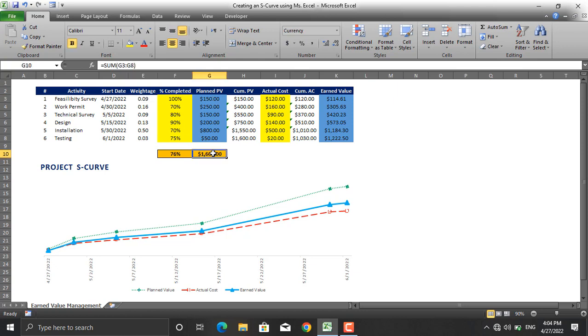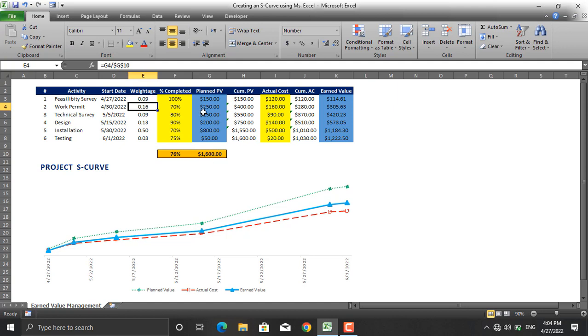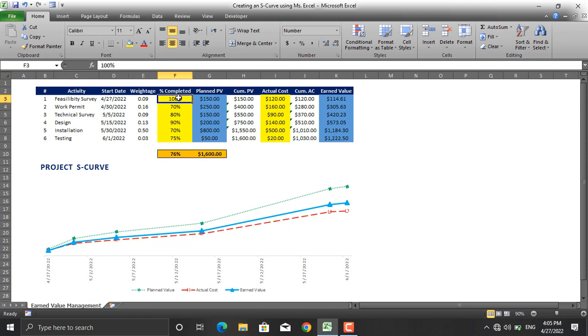Same goes for this: G4 divided by this value, or $250 divided by $1600, and the weightages are given for each activity in this project. Next, the yellow cell which is the percentage completed, these are the cells that we are going to insert the values in.